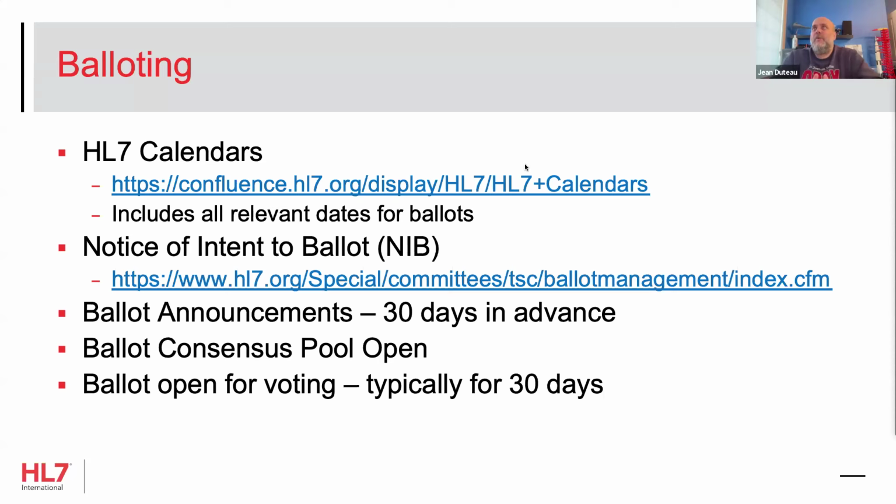And one of the things that TSC hates hearing, but we understand, is I didn't realize about the NIB ballot. I missed the fact. Or sometimes we'll hear, well, I was expecting the project team, or the project team was expecting the co-chair to do this, right? That's what these trainings are all about. So for us as co-chairs, it's about knowing what these dates are and when the NIB deadline is, and letting the project teams know so that you can get to them, because they've got to come to you, and the NIB is a co-chair thing. Only co-chairs can do it. So they have to come to you.